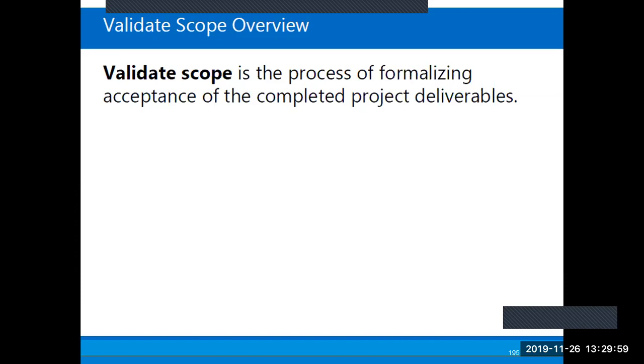The deliverables that come out first go through a process under quality control called control quality, and they check it for defects and quality, whether it passes the quality control test, or the quality standards defined by the organization or by the customer. Okay, good. If that process is okay, the deliverable is now called a verified deliverable, as an output of control quality.